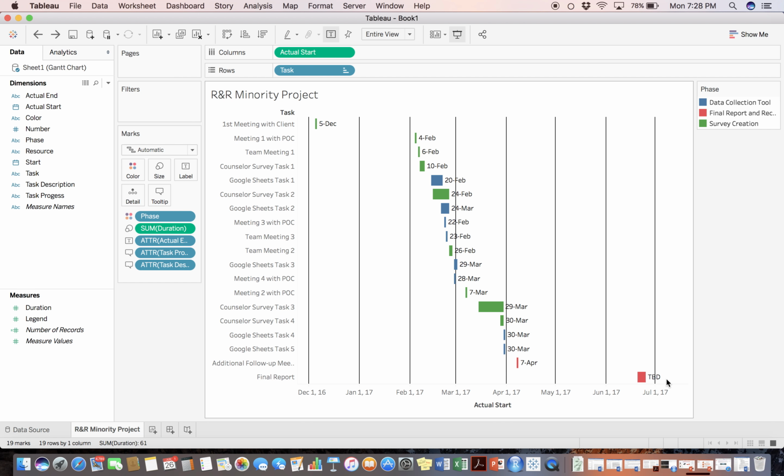So essentially, this is a hindsight explanation of a Gantt chart, because I've depicted dates and times with tasks that we've already completed and already worked through. But essentially what you would do is, before starting a project, we would draft the scope, and then use that scope to outline the key tasks that we need completed in order to reach our deliverables.